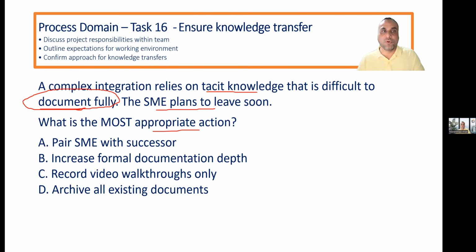And something cannot be documented, so there is no benefit in increasing the documentation. Record video walkthroughs, maybe, but only no. Tacit knowledge collection is best when you pair the people with others.